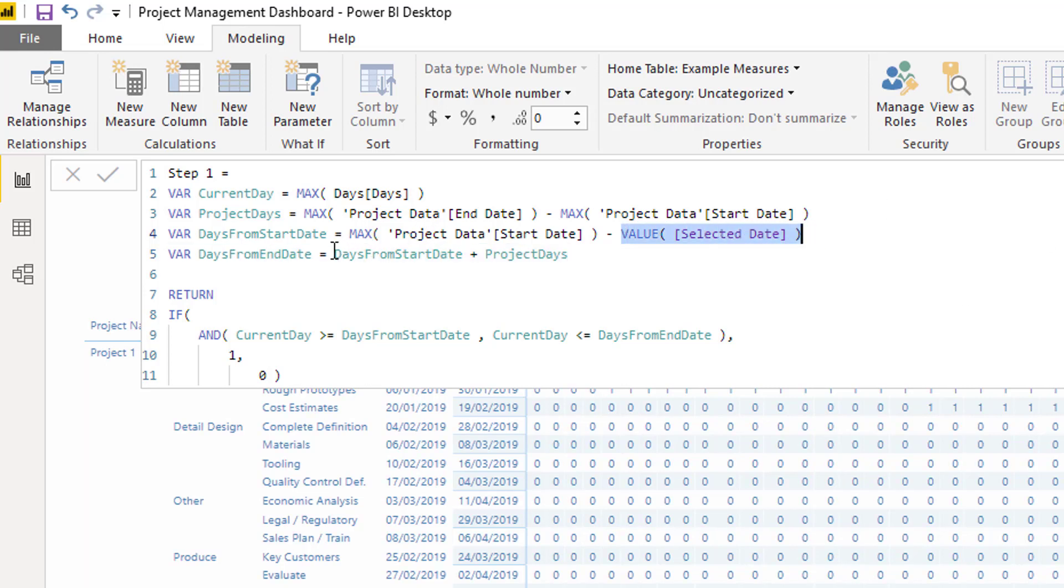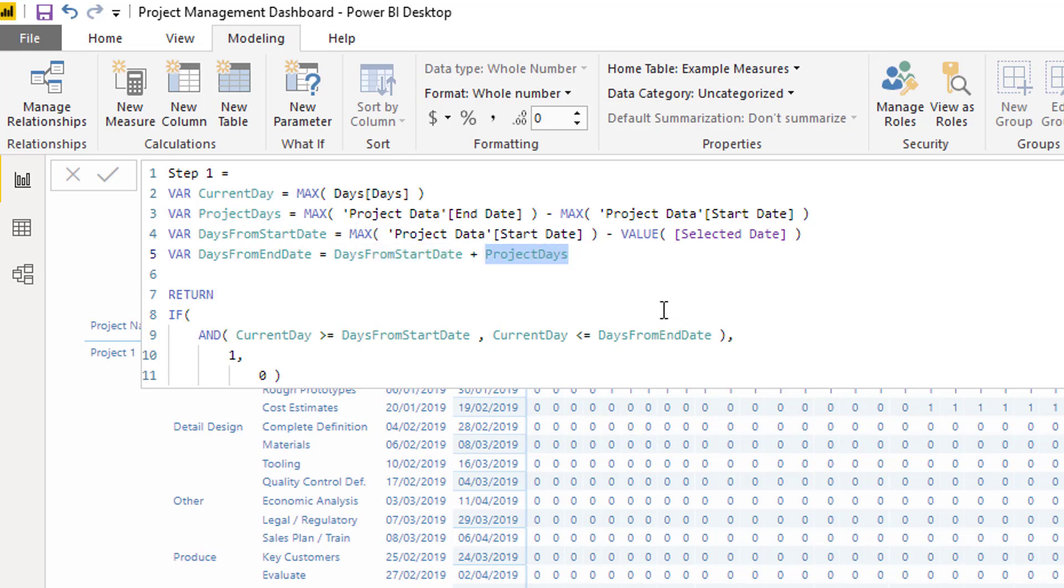Then my days from end date - these are two very important variables - is day from start date plus project days. So you see how I'm turning dates into numbers, numbers from a selection. That's basically what this logic is looking to apply here.